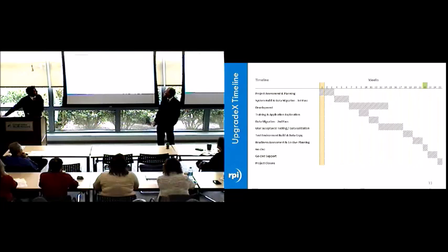It's pretty standard waterfall methodology that we have here. It's measure twice, cut once. So in a moment, we'll talk about your test plan. That's a big piece of the puzzle for us. But during the first pass, as Richard said, we're running a stopwatch on each step to make sure that with the lift and shift approach, there's enough time in a downtime weekend to get all of your on-prem data from your servers up into the cloud, transformed. If you're moving from Oracle to SQL, there are some steps involved in that, obviously the application upgrade.